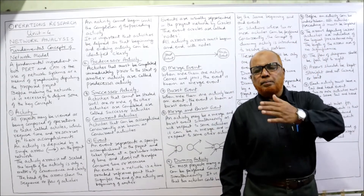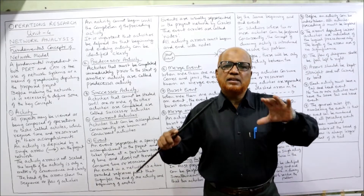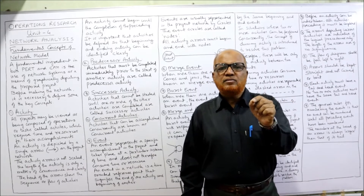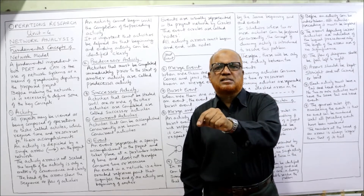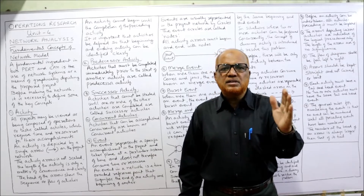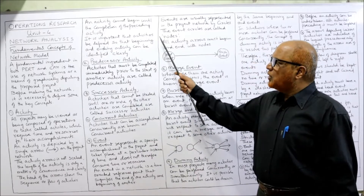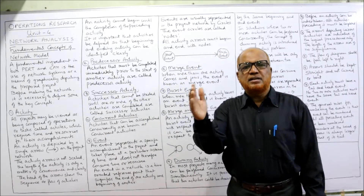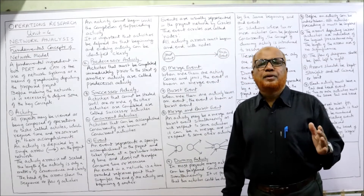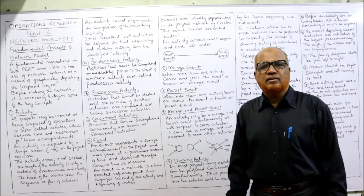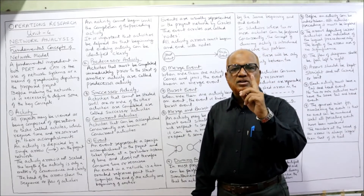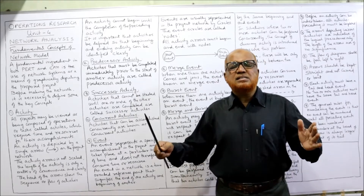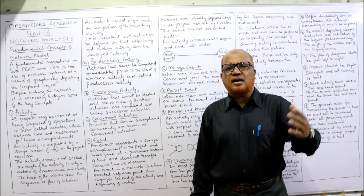An activity cannot begin until and unless all preceding activities are completed. In the network diagram we have to make the relationship between predecessor activity and successor activity — which activities should be done first and which activities should be done next. It is important that activities may be defined so that the beginning and ending activity can be identified, named like A, B, C, D or 1, 2, 3.